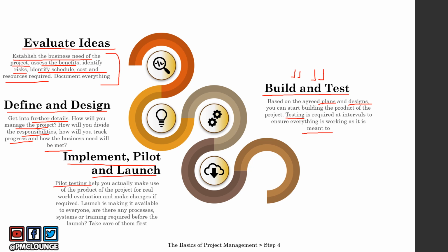So pilot testing helps you actually make use of the product of the project for real world evaluation. Your bridge is ready, but you're not going to open it for public use the next day. You need to do some kind of pilot testing to make sure that in the real world your bridge is just as useful. And then when you launch, that's when you're making the bridge available to the public.